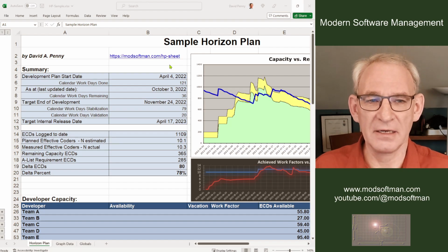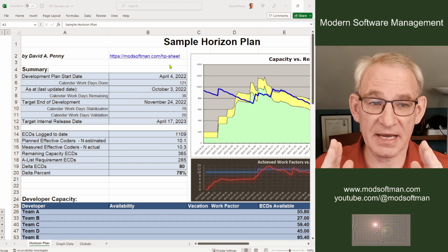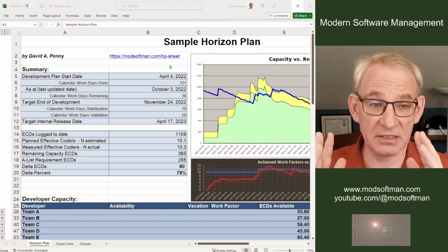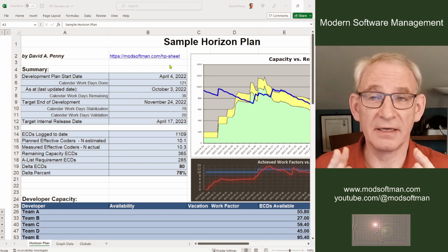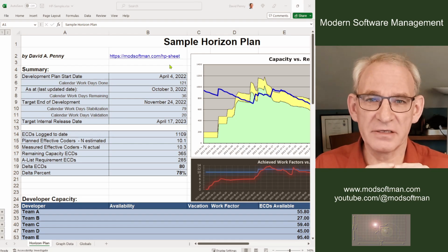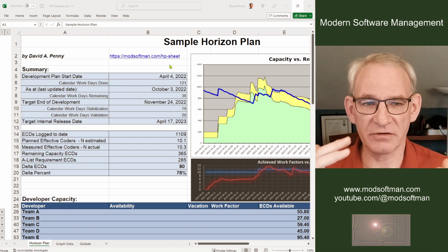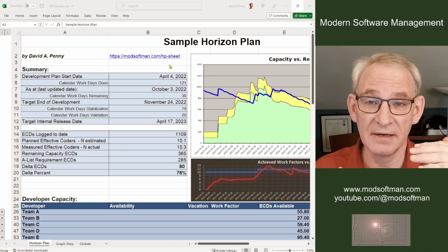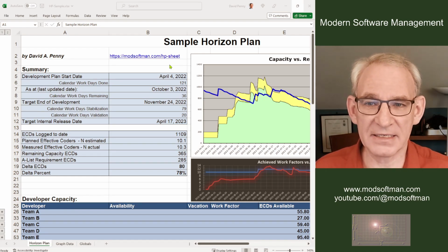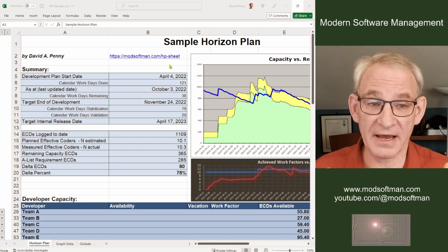And so there's a time during which you code and test and add automated tests and integrate continuously, called the coding phase. And then there's a phase after that called the stabilization and validation phase, because the software gets installed into so many diverse customer environments and there are so many possible upgrade paths. It runs on so many different platforms. It requires a lot of back-end testing, and there's a lot of complexity involved in that. So it has these extra phases of stabilization and validation.